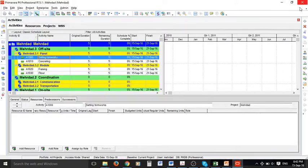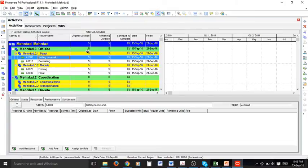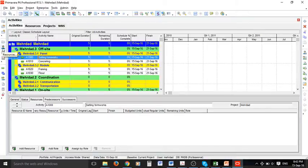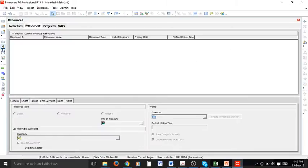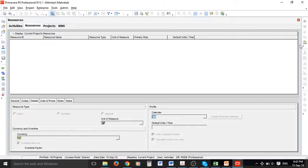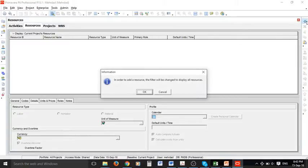As you can see I'm in the activities view of Primavera. It is important to go to resource view by clicking on this icon on the left hand side menu. If you do so this new window opens and on the right side we have this plus sign and we can add resources.